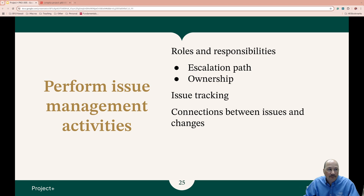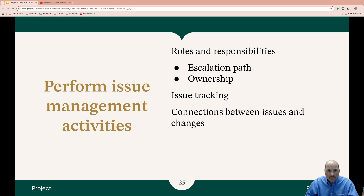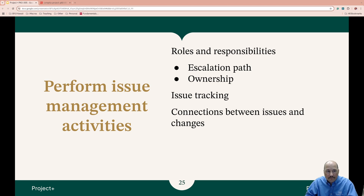We're going to be talking about issue management activities. You have to understand roles and responsibilities — who do you escalate to when a problem occurs? Which problem goes to what teams? And at what point in time do they need to be escalated higher? Who's the owner of a specific track when issues come up? Owners should ensure that proper documentation, updates, and resolution will be given, and that should be defined within a defined timeframe.